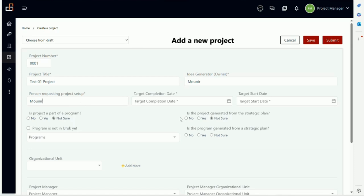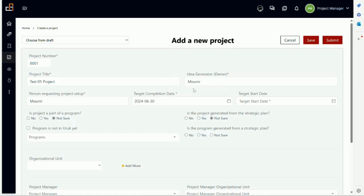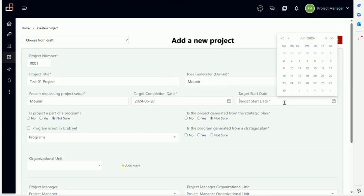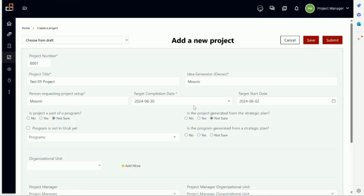Right now here you have two more fields: target completion date and target start date. We want to finish this project on July 30th. Target start date is going to be—if I put the second here, which is today, it actually accepted it. It might sometimes depend on the time zone; it might say you need a future date. So let's say we want to start this project today and it's going to be finished on the 30th. These are targets, not plans yet. In the future when we are managing the project, we can do cost and schedule estimates and other things.